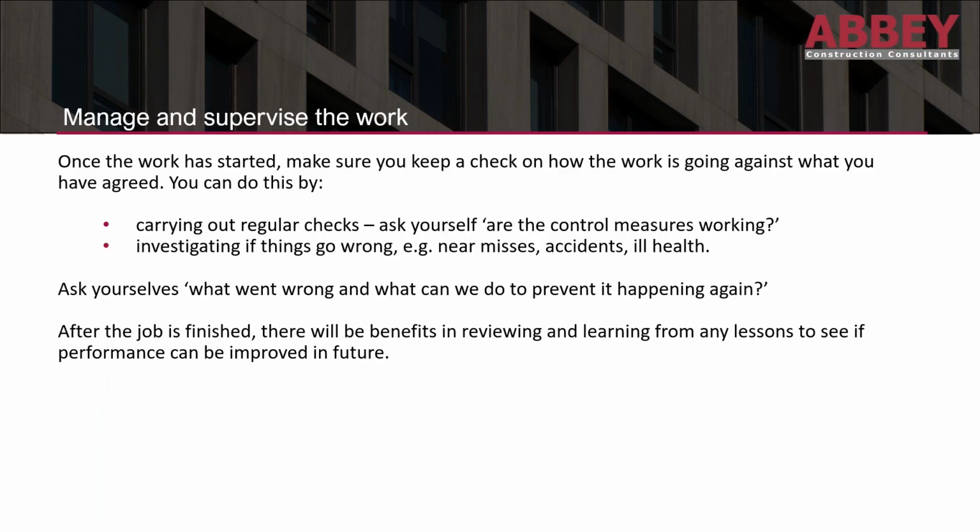Once the work has started, make sure that you keep a check on how the work is going against what you have agreed. You can do this by carrying out regular inspections. Ask yourself, are the control measures that we've put in place working? If they're not, then they need to be upgraded. If they are, then you need to make sure they're maintained.